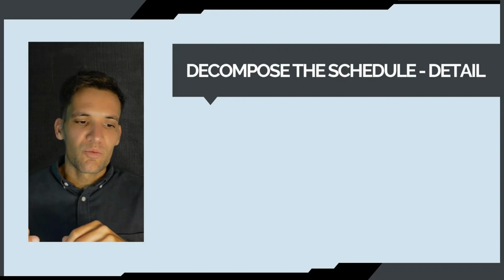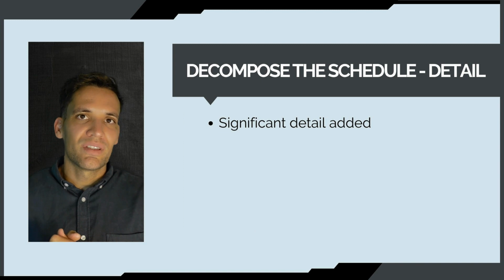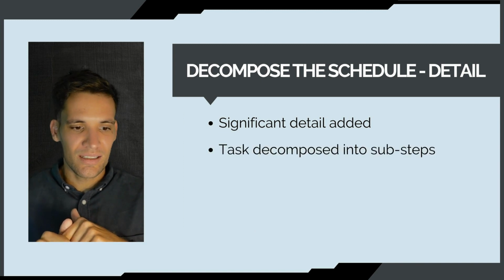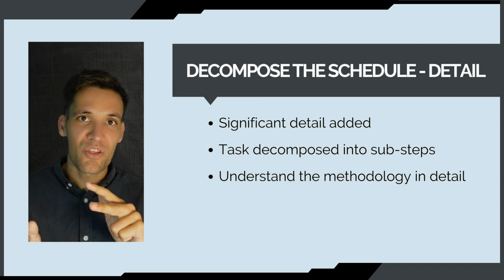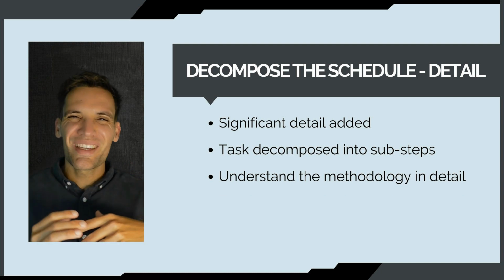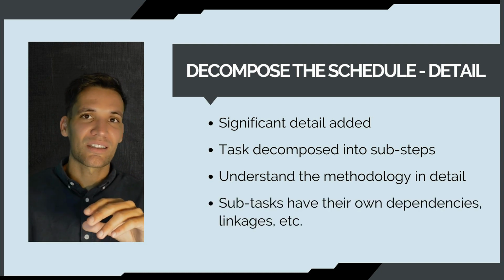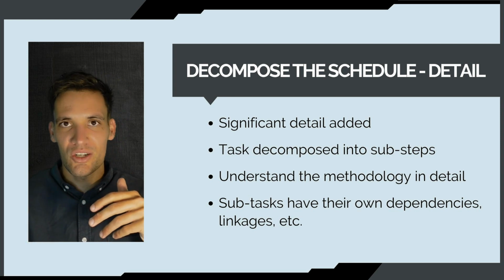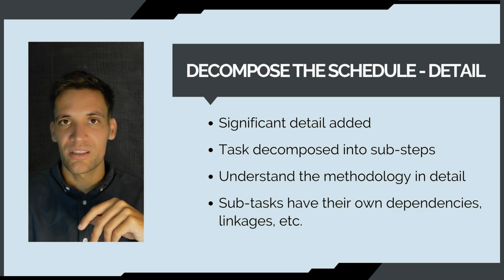Through this process, we're adding significant amounts of detail. We're decomposing every task into a set of subtasks. We're understanding the methodology with which we're going to complete the task. And then it's also helping us understand, for each of these subtasks, what are their own durations? What are their own linkages? What are their own considerations that we need to make to ensure that they happen?